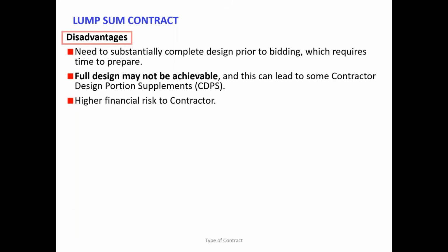Therefore, what will the contractor do? If you transfer the financial risk to the contractor, he will add a risk premium. He will definitely price the risk like a risk contingency. Say your contract sum is 100 million. Let's give 5 million for risk contingency. If any unknown situation happens, we can use that amount.